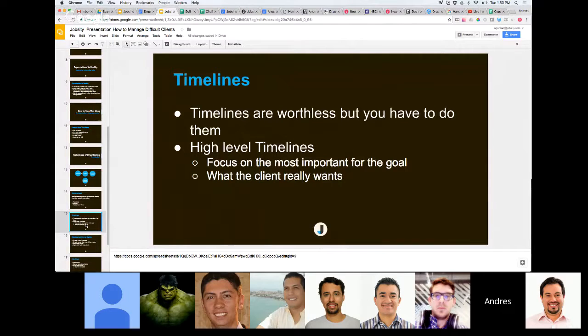So, responsibility. Okay, you're going to be in charge of this whole section. Well, you better do your timeline for yourself, even if you're going to do it yourself. If it's going to be more than 3 days of work, create a timeline. Organize yourself: how are we going to finish this? Because you don't want to be 2 days before the deadline thinking, okay, how am I going to do this? There's so much work, and then you rely on the PM to do something like that.